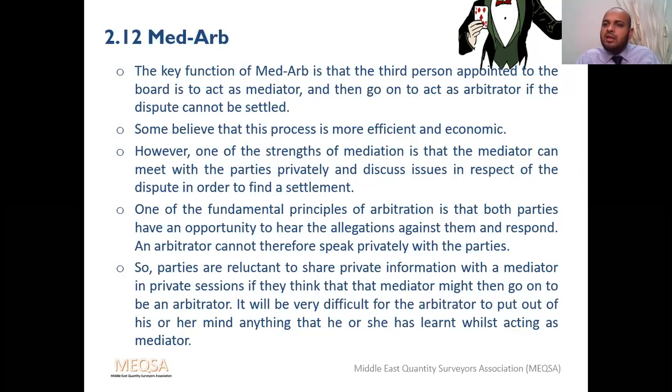Why it is very important: the mediator knows what is actually going on. He has been there from the start of the process, so he has an idea of what the solution should be. He will try to convince the parties in an amicable way. If the parties do not agree, he will issue an award. Now he becomes an arbitrator, the further process will start and he will issue an award. Or a party can ask for a different arbitrator, who will review everything again and give his award. This is the Med-Arb process, a very effective process, but a very late practice. Mostly they go for conciliation from the institute itself. If you go to an arbitration institute, they will refer to conciliation first, then they will go for arbitration. So that is Med-Arb, if you can agree.